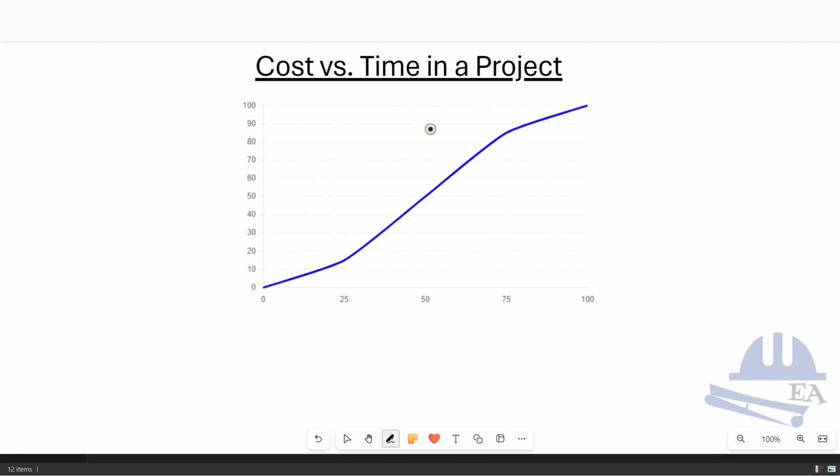Almost all the projects normally show a typical pattern of project progress, that is slow progress, and after that a rapid execution, and then a tapering off as the project nears completion, which means that at the start and end of the project normally the work is slow, and in the middle the work is fast. So in the S-curve, if you see, we have got the time on the x-axis. So this is the time axis, and on the y-axis, we have got the work completed.